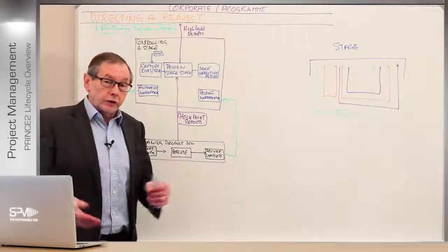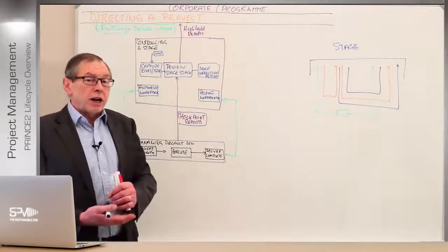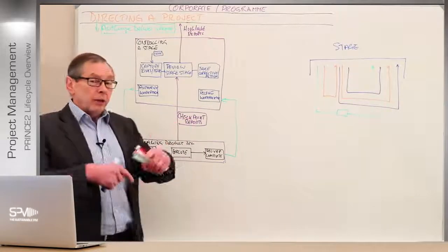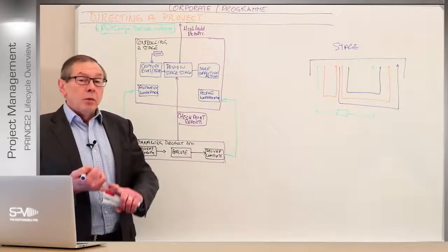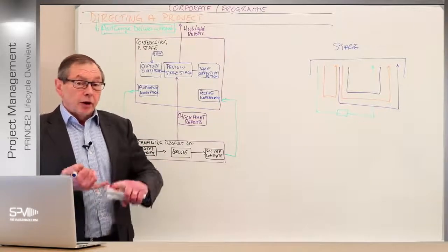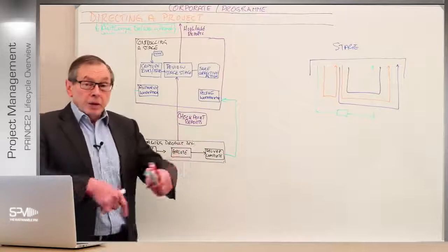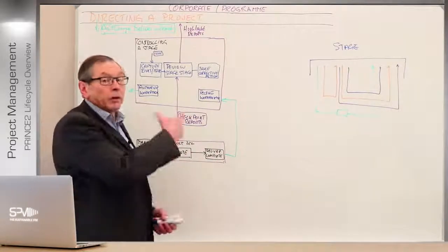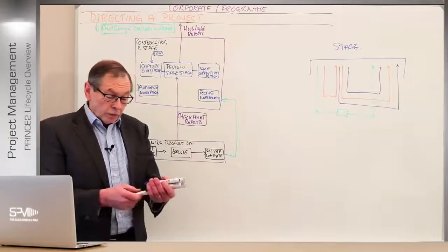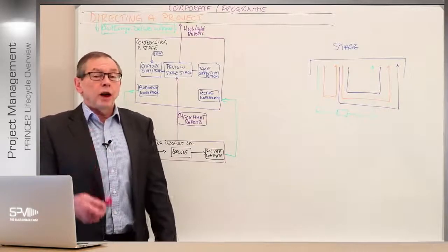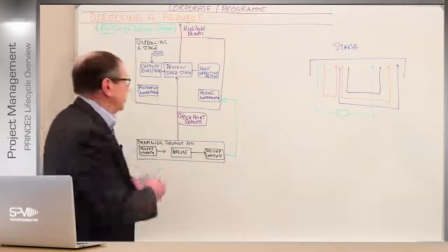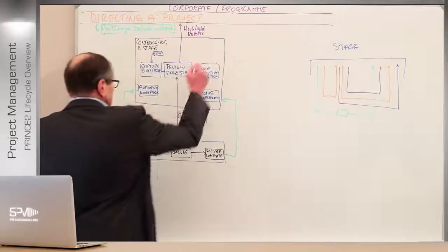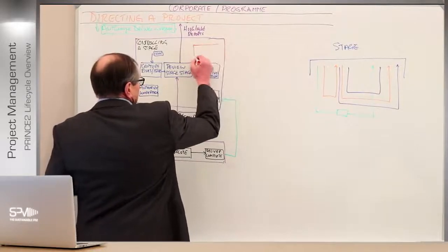We look at all this, the configuration and the change management, issue management, in another session. But what happens now is that the PM is going to decide, is it within my remit to fix that up? Yes or no? If yes, then the PM can do something about it and fix it up, but obviously document the first thing you're going to do. If not, then the PM has to decide, do I need some help? And at this point, they may well need to decide to escalate, so I'm going to put this in red here.